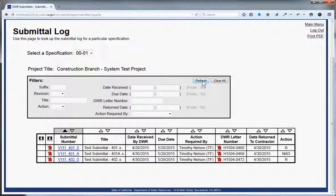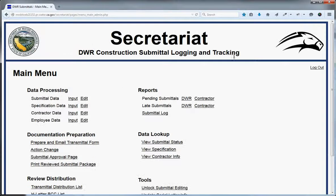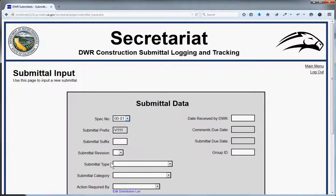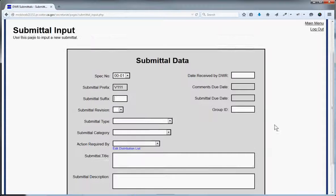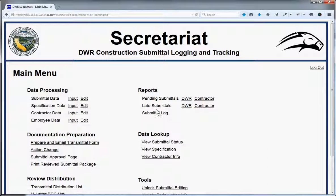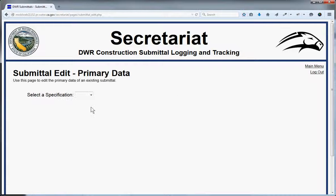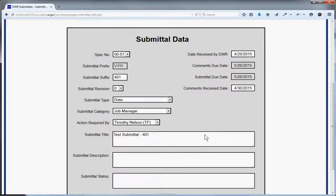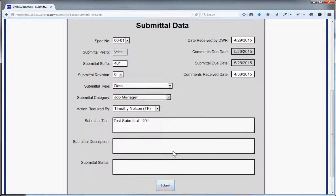Back in Secretariat, the submittal doesn't appear in the log until it's been logged by staff. Some staff at the Department of Water Resources Construction Branch receive notification emails when a new submittal is uploaded through Forklift. They download it from the cloud, go to submittal data, input the submittal, fill out all the metadata, and hit submit — then it appears in the log. They can also edit submittals the same way: go to the submittal, and the form is pre-populated; hitting submit updates the existing record rather than inserting a new one.